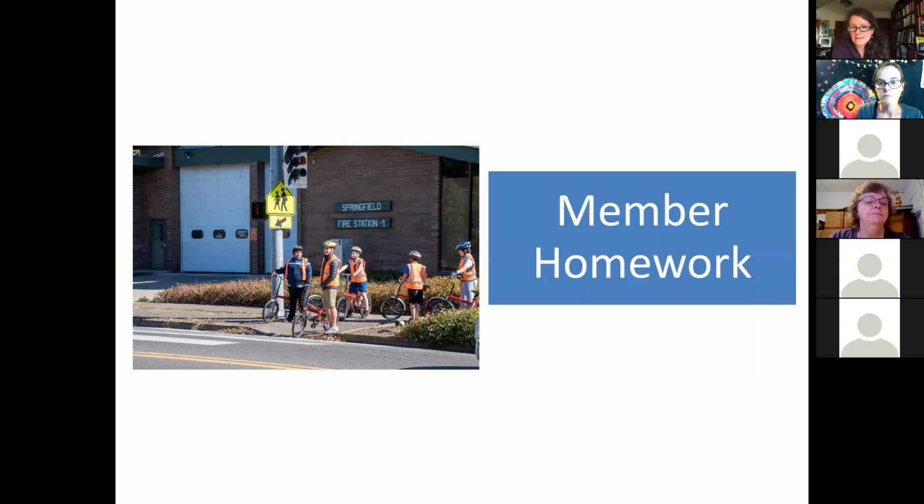Luis here. Please remind me what the match for public agencies is. Great. The match for the Safe Routes to School funds in general is 40%, but that can be reduced to 20% if the applicant is a city under 5,000, if their school is a Title I school, or if they have a project on a priority safety corridor. So most of the applicants will be able to get that 20% local cash match. Also note that ODOT pays the whole 40% cash match whenever ODOT applies for these funds. Does that answer your question, Luis? Thank you. You're welcome.